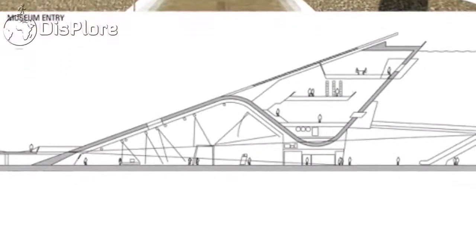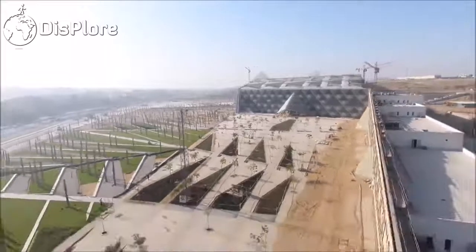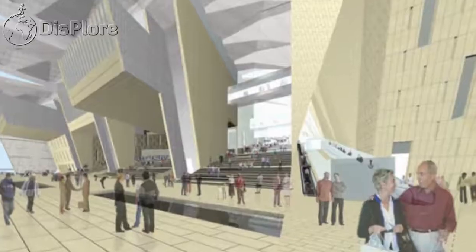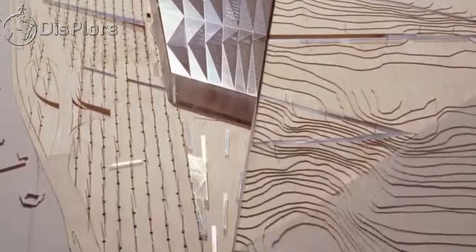The competition was won by architects Róisín Heneghan and Shih-Fu Peng and their company Heneghan Peng Architects in Ireland, winning $250,000. With their win, Heneghan Peng Architects designed the building. The exhibition master plan, exhibition design and museology is by Atelier Brückner. In late August 2008, the design team submitted over 5,000 drawings to the Egyptian Ministry of Culture. Following this, the construction tender was announced in October 2008.